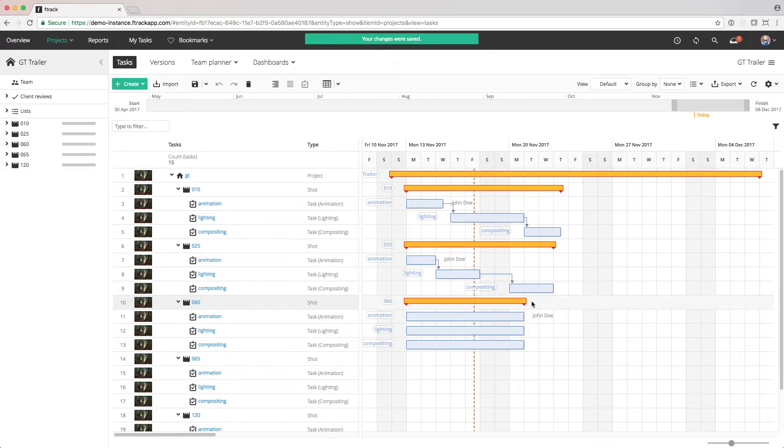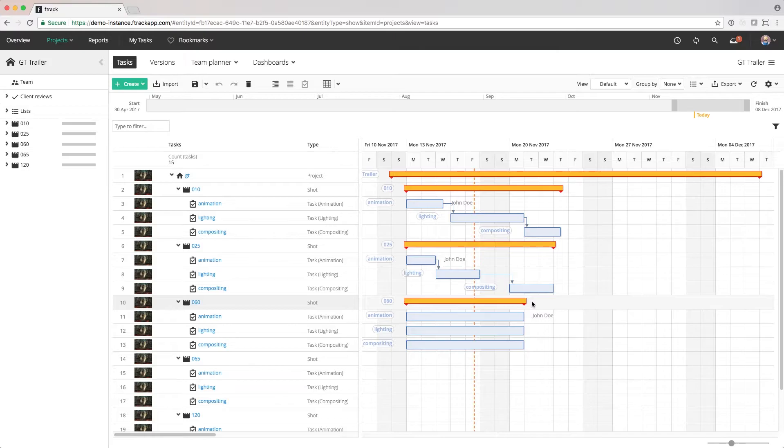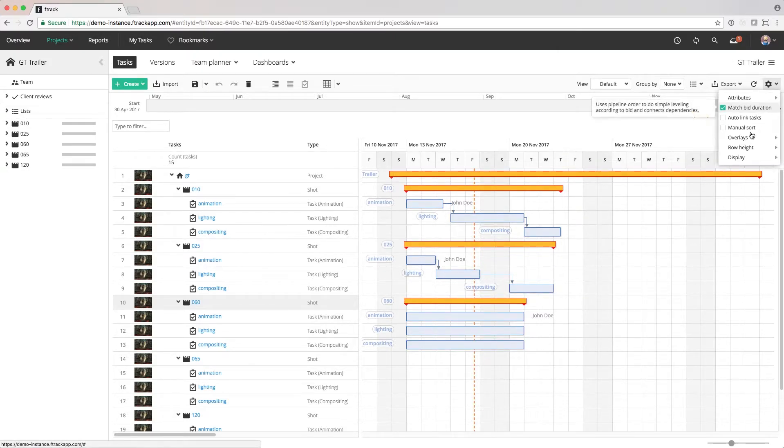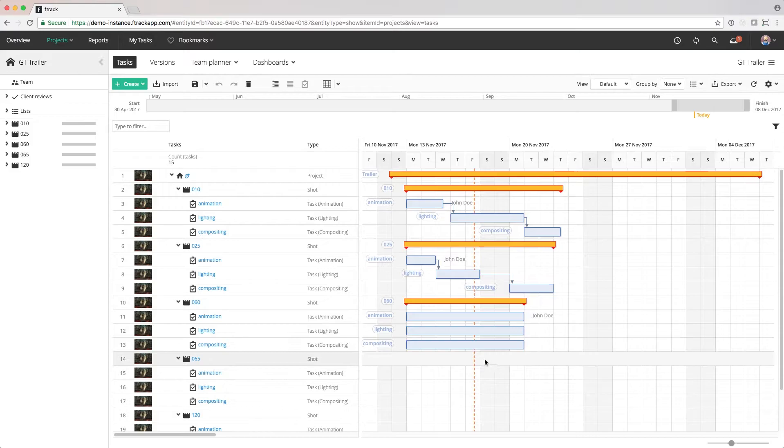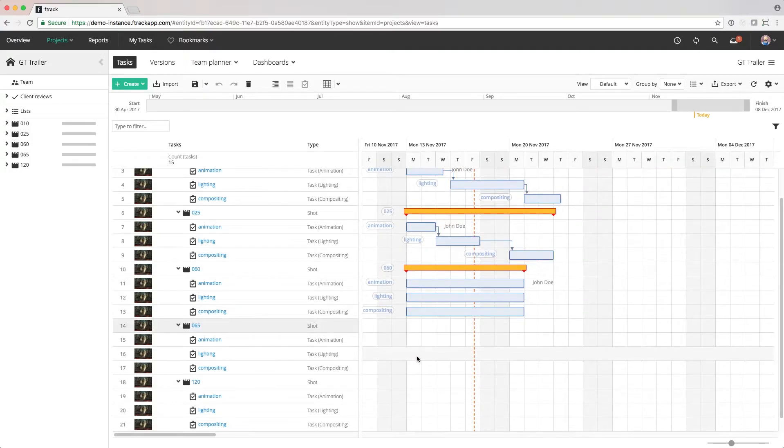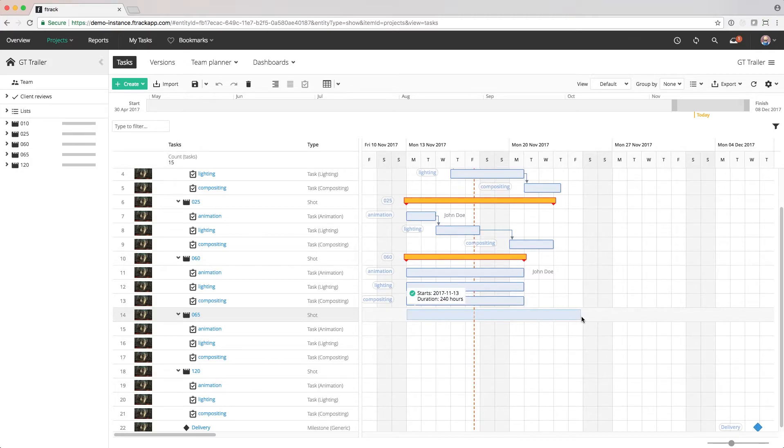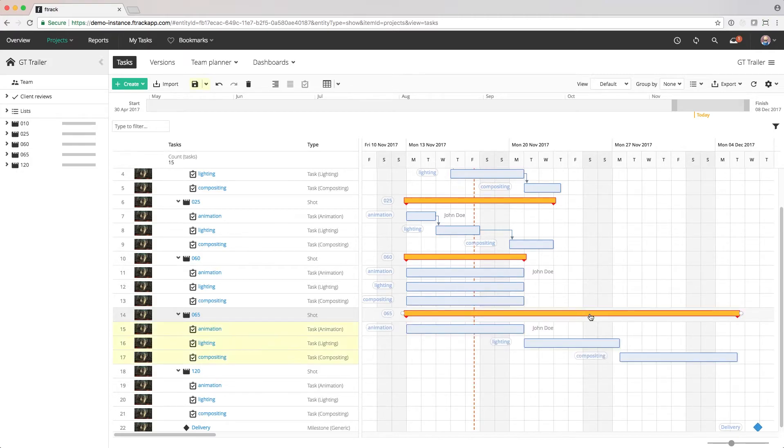But another option is to enable the match bid duration setting. To have any tasks we schedule have the start date we choose that have their duration set to the bid of the task. This way, we can quickly drag out all tasks on a shot at once, and then just move them slightly in time if necessary, or one task at a time if we prefer.